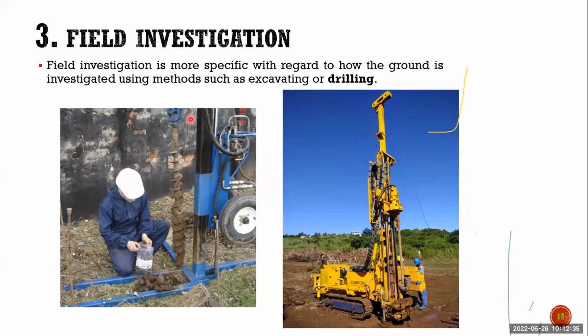But the drawback of this method is that we don't get a complete soil layer everywhere. It's a mixture of boulders, or you can get rock in between. So this method is not applicable for all regions. Another method is called rotary borehole drilling. This is a drilling rig actually.